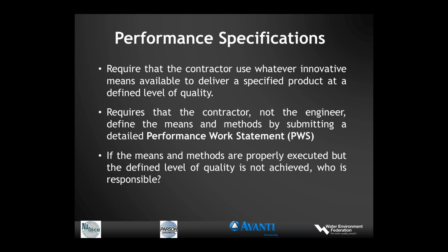This requires that the contractor, not the engineer, define the means and methods by submitting a detailed performance work statement document as a submittal. Now, in this case, if the means and methods are not properly executed, who is responsible? Well, of course, it's the contractor.